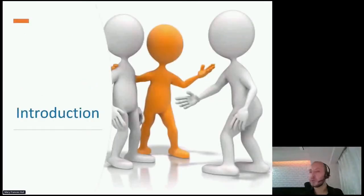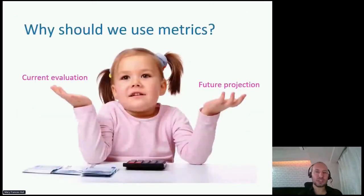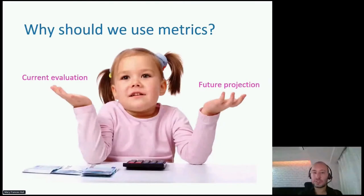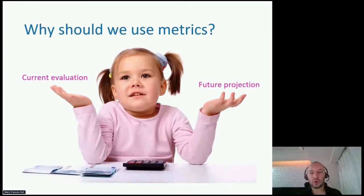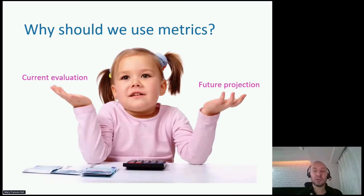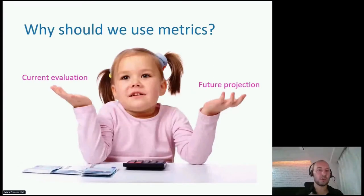Why are we doing this? What advantages can we get from these monitoring activities? First of all, we can evaluate our current situation — whether we are good enough to proceed to the next steps or if we should change something. For example, we can see what percentage of tasks we have completed, or the portion of requirements covered by test cases. Maybe half the requirements are covered and the second half are still waiting. We can also see the number of executions finished, or how many bugs we have — critical bugs, low priority bugs. We can observe and track all of this with the help of these metrics.